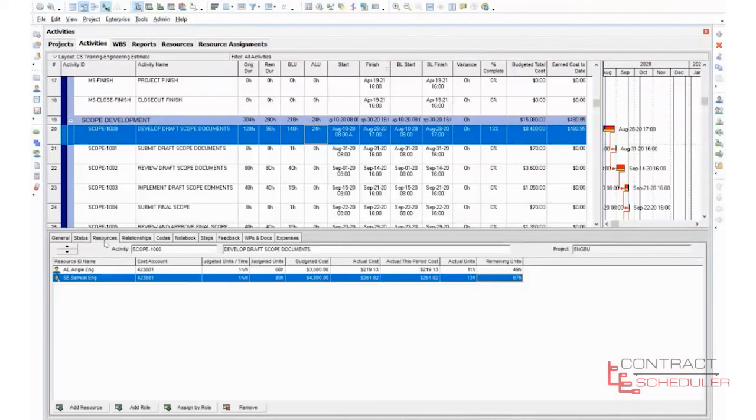And again, you can go to the resource tab and you can adjust accordingly, and it will do that. Now you're going to say, look, those hours aren't the same, and I had to estimate the same under resource assignments. Well, I'm not looking at minutes, and Primavera will go ahead and adjust with the minutes just to evenly distribute the time. So that's why you're not seeing that be exactly dead on, okay?